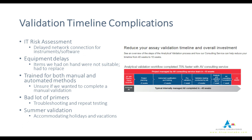We had some equipment delays — not with the sequencing equipment itself, but some general laboratory needs. Centrifuges we thought would work ended up not working for us because of the tube sizes for sequencing, so we had to make some replacements. Extraction is always an issue — we are a full-service molecular laboratory with several different extraction methods, but sequencing was a new entity and our existing methods were not going to provide the quality nucleic acid needed for sequencing testing, so we had to switch processes to achieve an extraction workflow that fit the input requirements for NGS.